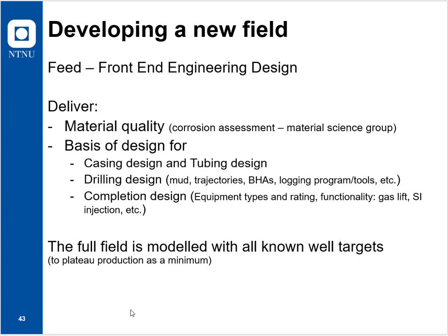And you do this design for more or less all wells. You find your outer layers. If there's a vertical well, if there are extreme ERDs, you do the designs and you see what would be in the middle. You need to have a frame. This is what I'm going to do. And then you make your orders of casing and long lead items.